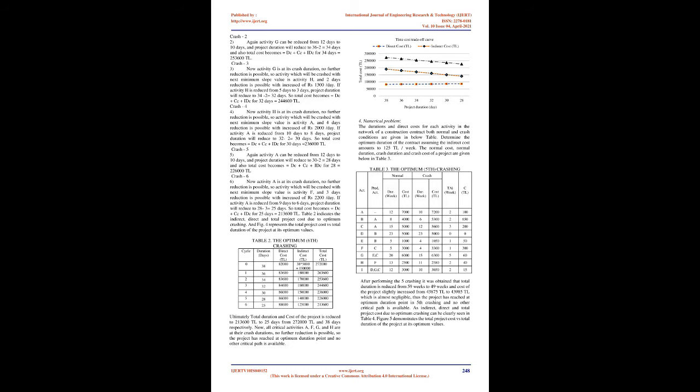Critical path: those activities with the least slack form a path through the CPM diagram from beginning to end. A sequence of project network activities which adds up to the longest overall duration is known as the critical path. Any delay of an activity on the critical path directly impacts the planned project completion date. The CPM representation of the present project is shown in FIG 2; bars with red colors are critical activities (A, F, G, H) requiring maximum resources, and bars with green colors are the remaining non-critical works. The normal cost, normal duration, crash duration, and crash cost of the project are given in Table 1. The indirect cost of the project is 5,000 rupees per day, and the optimum total cost and minimum duration are to be found.